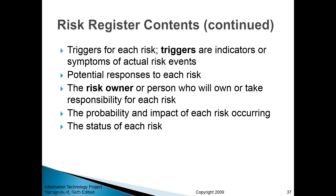Also included are triggers for each risk. Triggers are causes, indicators, or symptoms of actual risk events. Sometimes a risk itself can be too fuzzy or subjective — for example, 'lack of employee cooperation' — but a trigger can be more specific and measurable, such as no meeting scheduled for the duration of one month, which could indicate poor cooperation from users or employees on a particular project. An important part of a risk register is potential responses to each risk, as well as risk owners — people who are ultimately responsible for addressing the identified risk. You may also include the probability and impact of each risk occurring, and the status of each risk: has it occurred, is it being dealt with, has it been properly addressed?